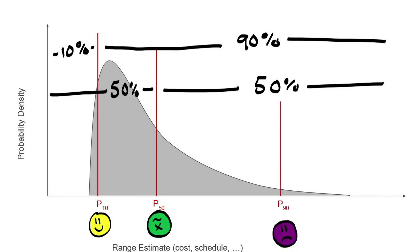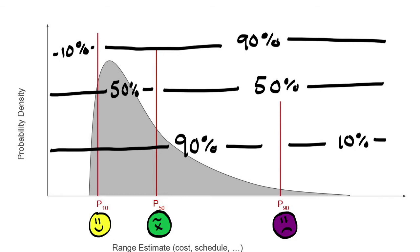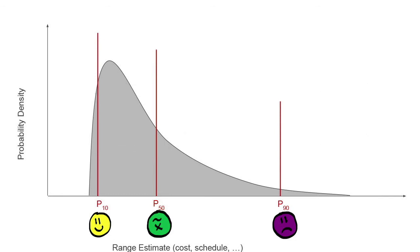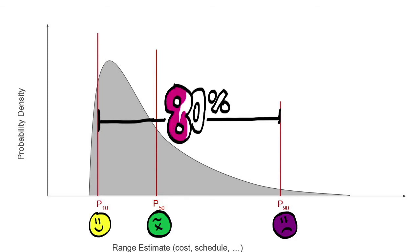And the pessimistic case is the P90, 90% chance of lower, 10% chance of higher. Using this definition, there is an 80% chance that the final cost would fall between the P10 and the P90 points.